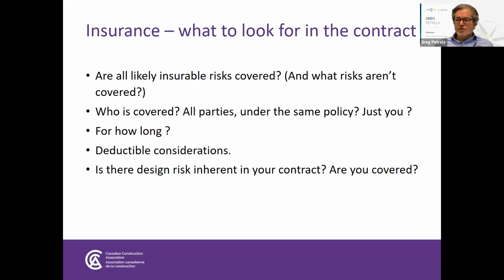Most of those financial losses are considered by the insurance community to be business risks, in other words, uninsurable risks. That's the business risk you take to be in the construction business. So scheduled delays and financial losses resulting from non-performance of your contract are not insurable. I wish they were. I'd have retired long ago, but they're simply not insurable.